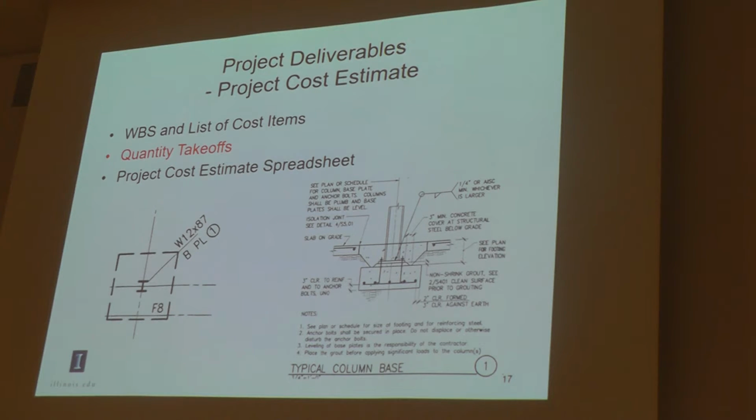This is an example here for the footing, the excavation quantity for this footing. As you can see, this is the volume of this footing, but the excavation is going to be larger than the volume of this footing, because we need to create a working space for the workers to place concrete. So this is the boundary we need to do the excavation for.